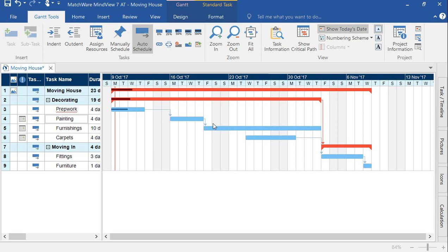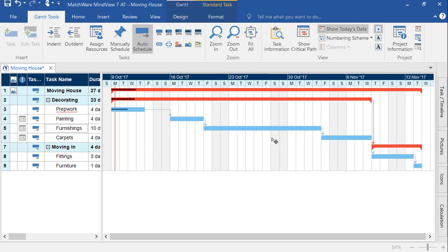To add a dependency, such as a predecessor, simply drag and drop from the middle of the taskbar to connect the two tasks together. That way, that dependency rule has now been created in the Gantt chart. I can also drag and drop the completion of each task.